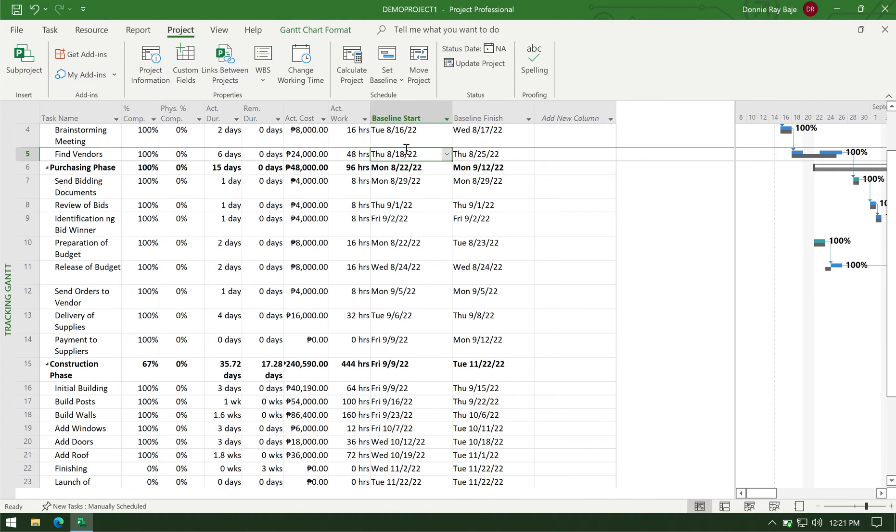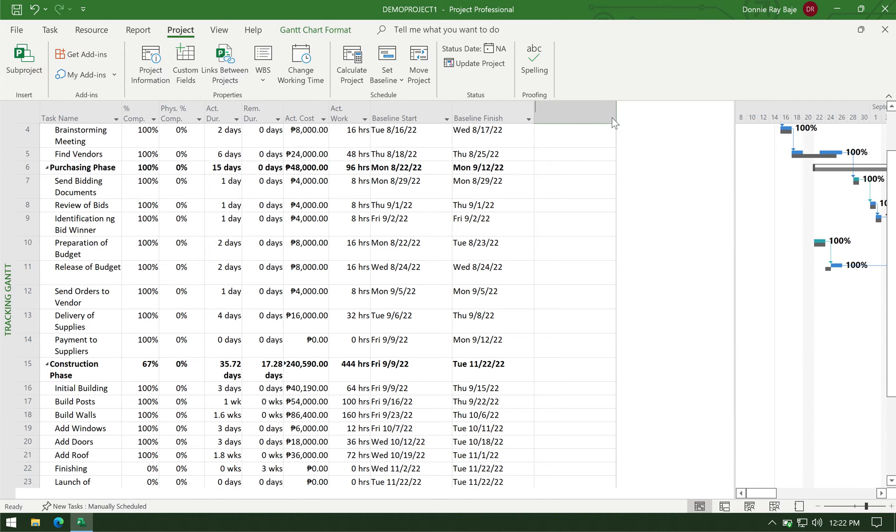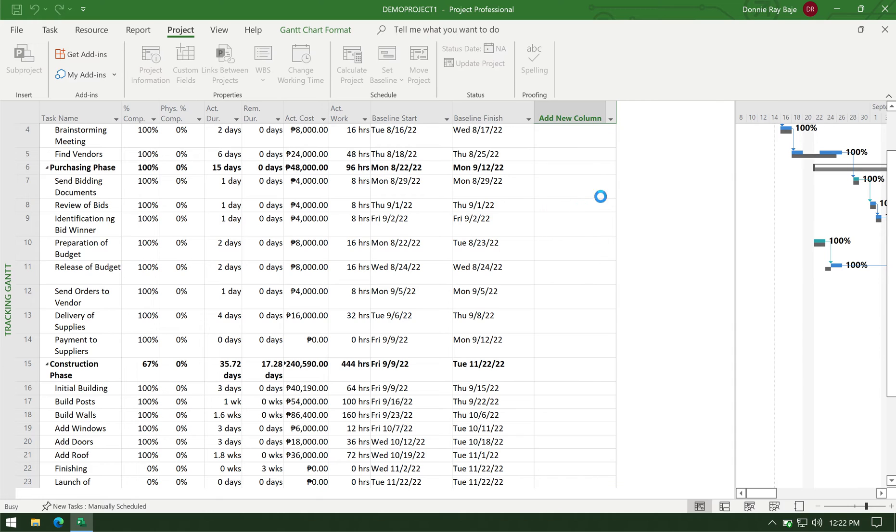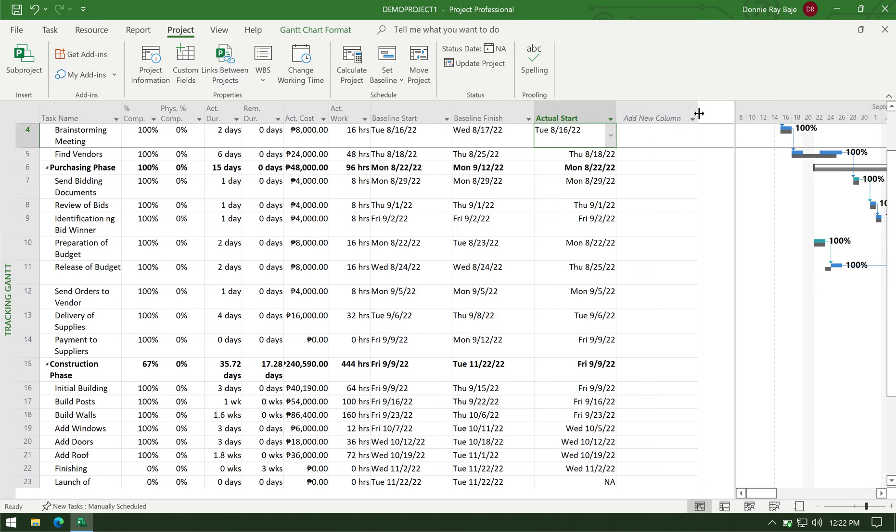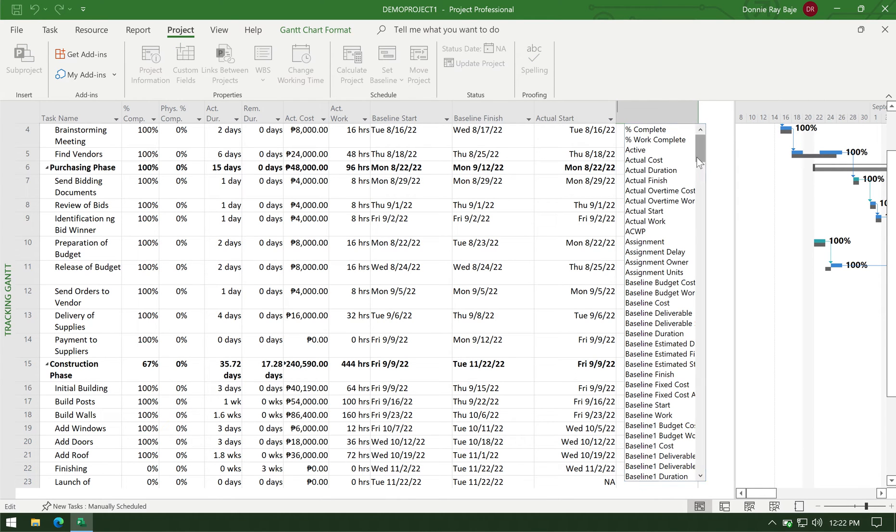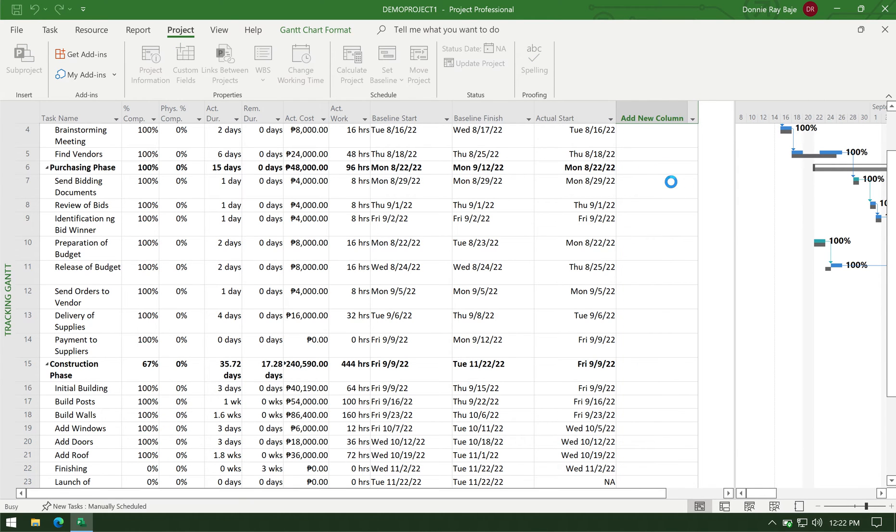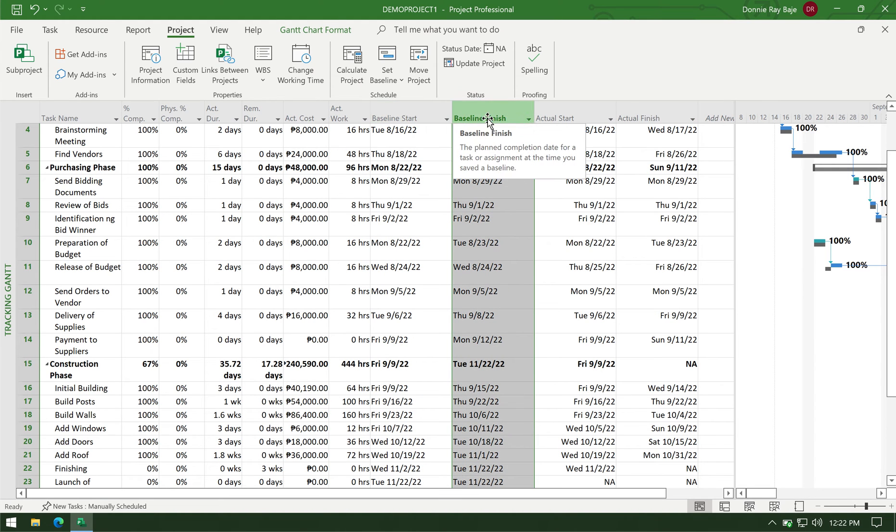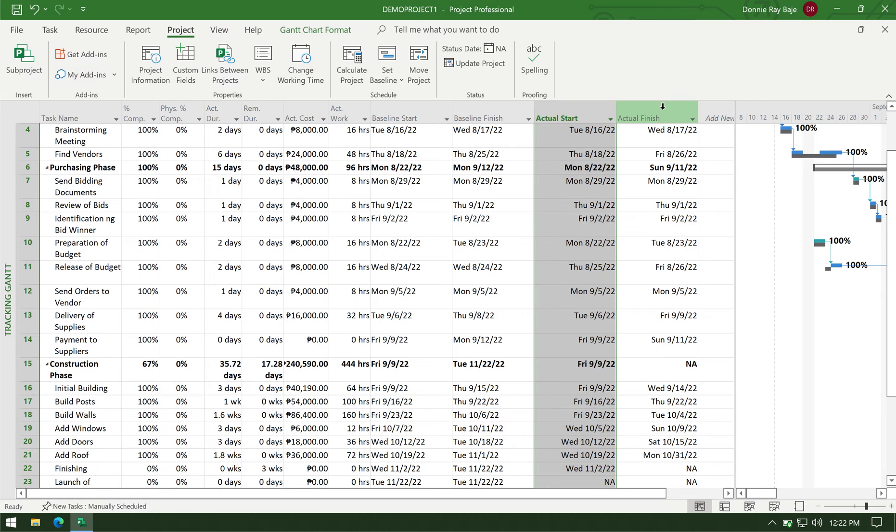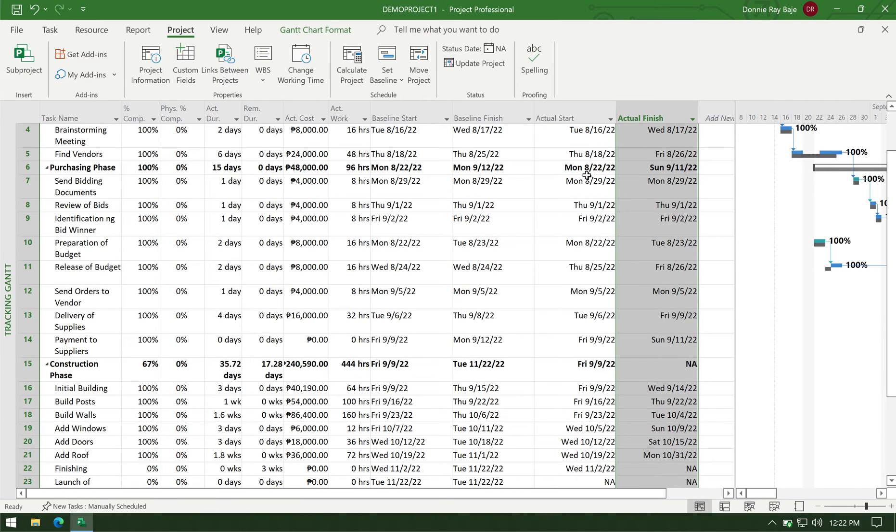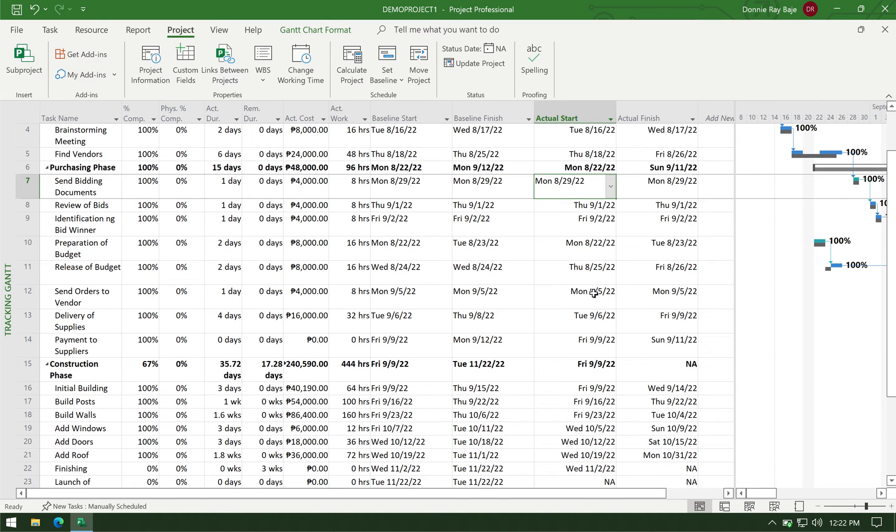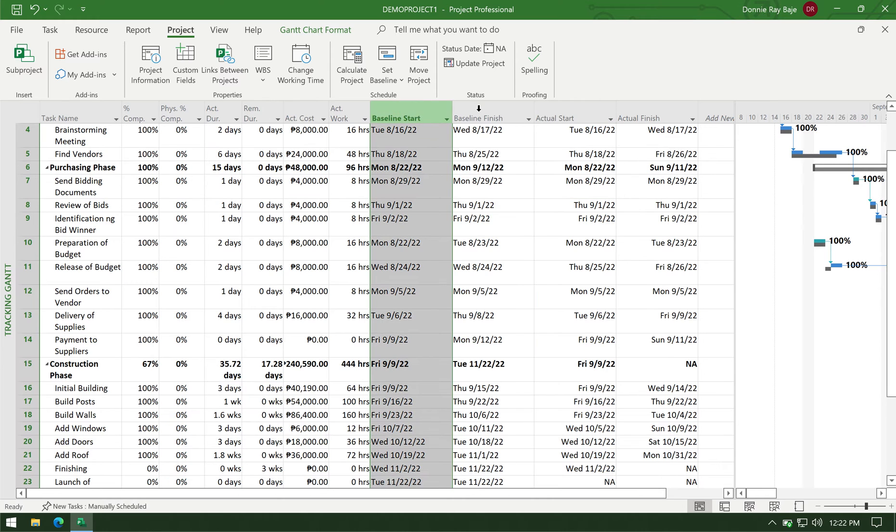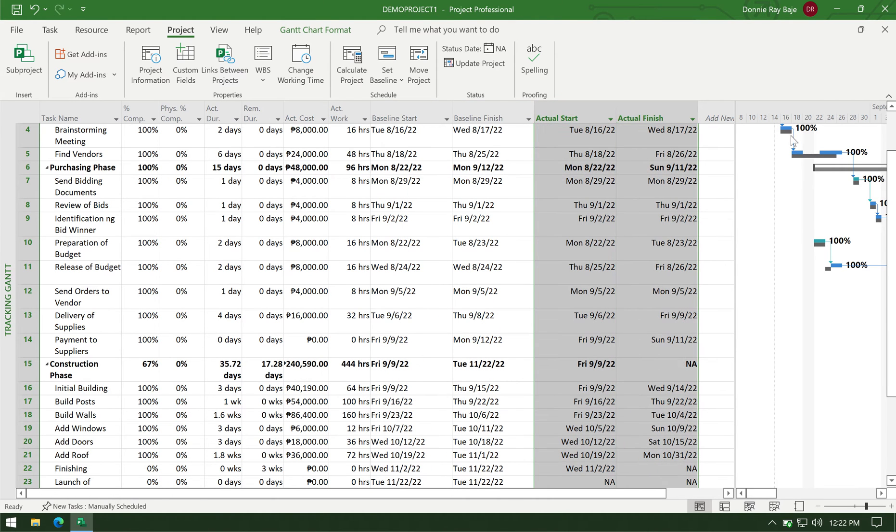And now that you've identified the target start and target finish, you can then put in new columns for the actual start and the actual finish. So you don't usually touch anymore the baseline start and the baseline finish because they were your targets. What you modify is the actual start and the actual finish columns. And here I already filled it out before I made this video because I don't want to consume time filling them out one by one. So I already have my baseline start and baseline end and actual start and actual finish all filled up.